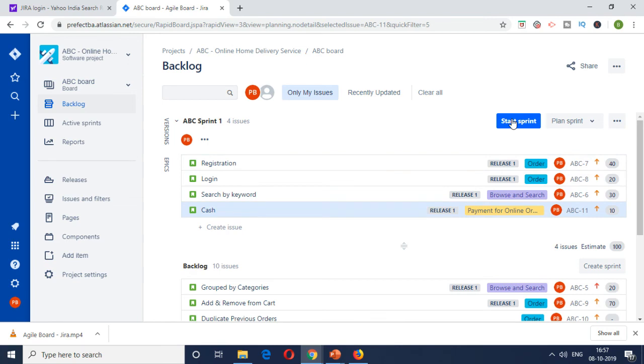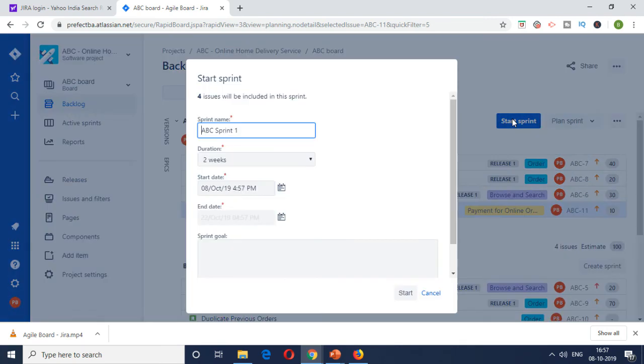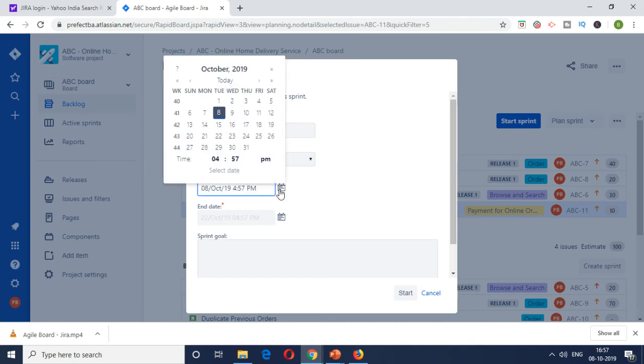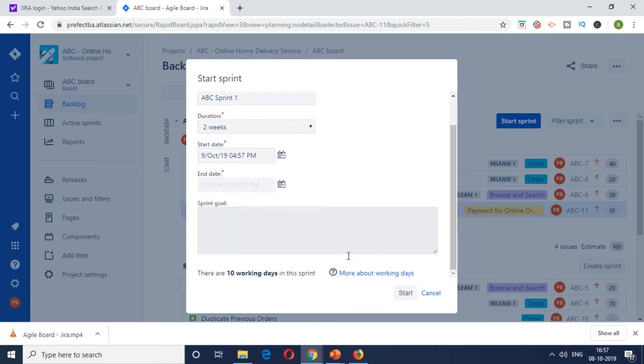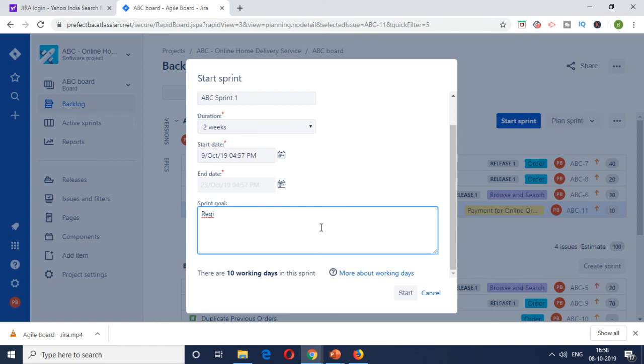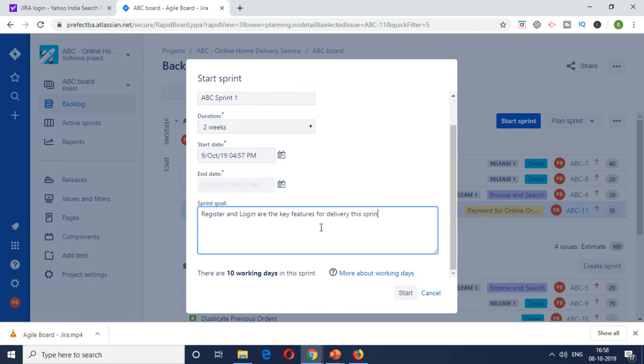So once you put it here, you can click on start sprint. You can keep ABC sprint number one, duration is two weeks. You can put it in the future because the planning of the sprint happens much earlier. Let's give a start date of tomorrow and then two weeks sprint. And what is the sprint goal? So you can type in the major features which you are trying to get in. So registration and login are the key features which are looking to deliver.